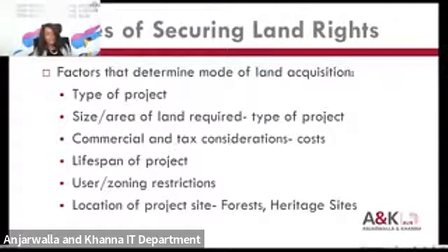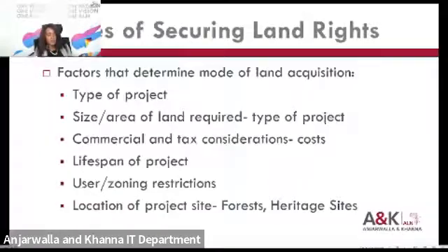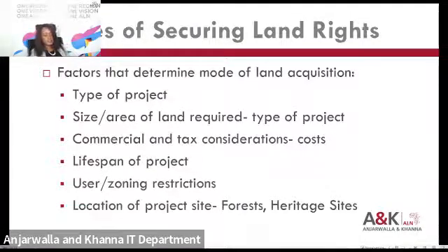Then the size and area of the land required will also determine the mode of acquisition. For instance, for roads, it makes sense to acquire the property. And then there could be other projects that require a considerable amount of land, and depending on the budget that has been set aside to run the project, it may make sense for the project company to consider other modes of securing these land rights other than acquisition, because if they do acquire the land, then they'll be required to compensate the landowners at market price, unless they're able to negotiate considerably.